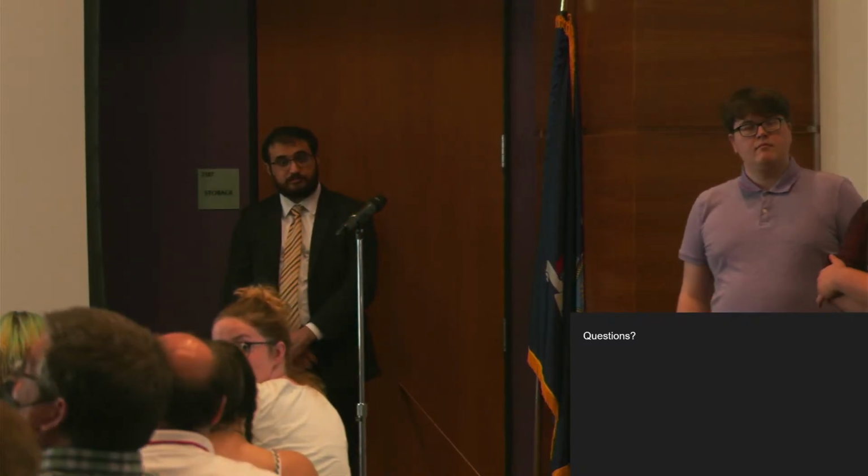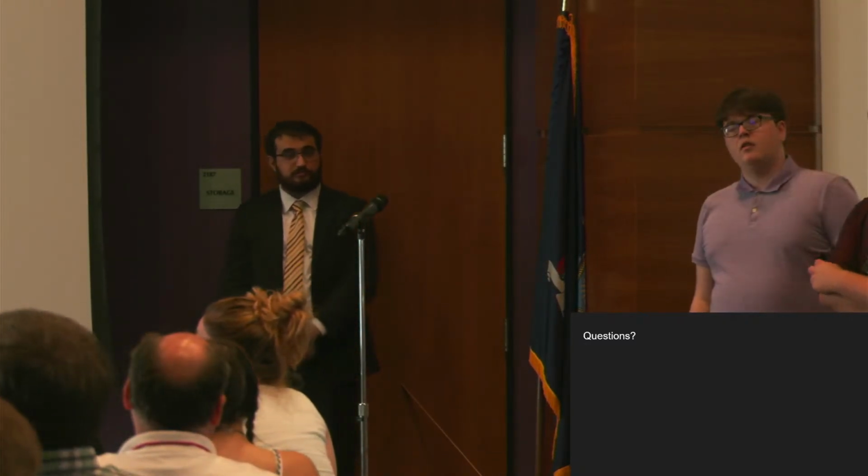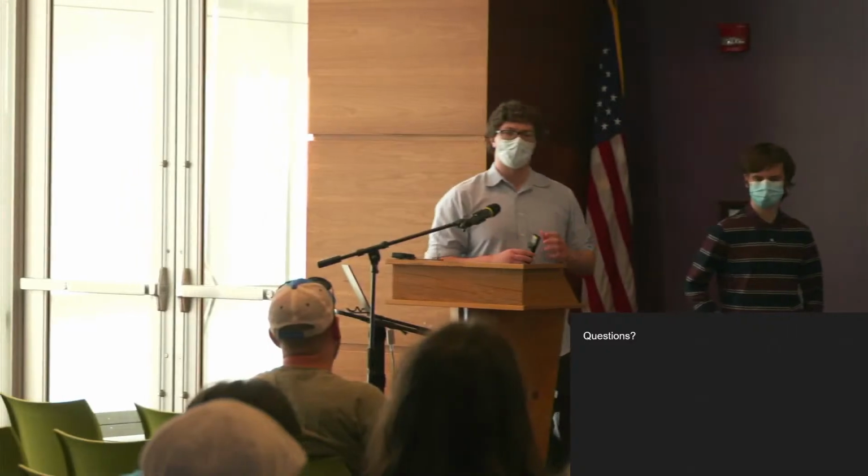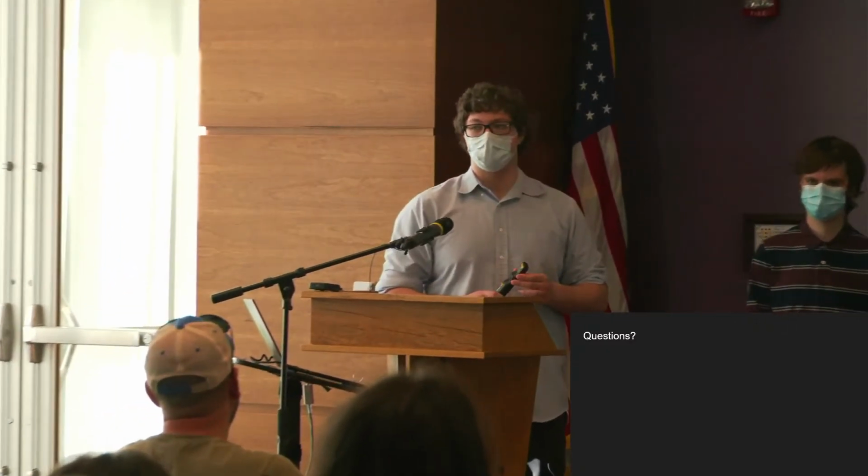Sure. A question from Dave on the YouTube live stream. I'm curious about why the inventory system didn't make it into the final product. I think it was just because of where we were at crunch time. We really needed everyone to make sure that the combat system was implemented, rather than dealing with story things like what the inventory system would be used for. We really wanted to get the main part of the project, which was the card battling, to work.